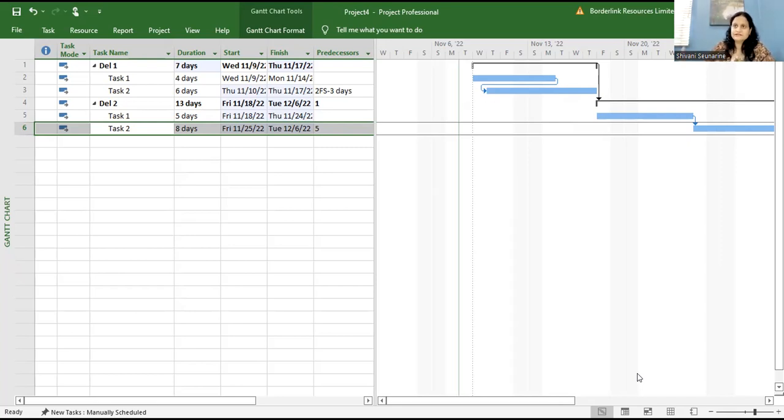At the end of the day, this is information that must be realistic, because as we keep saying, garbage in, garbage out. So to build a schedule, it's an organic schedule that you're building. What do we mean by building an organic schedule? We start with the start date, we put in our deliverables, we put in our tasks, we build our durations. And then you could do your relationships, which is finish to start, start to start, lag time, or lead time.